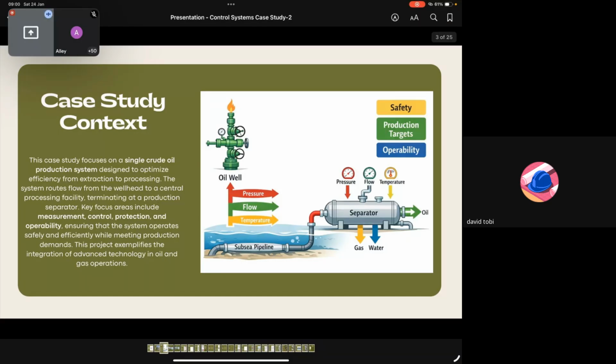So if, as a company, I have a template and I have some materials in stock that I can use, then if you give me the project, I can promise that maybe these other companies will have to go to Europe or the US to buy materials. But since I have it in my store, I can promise you I can deliver this project in 1 month. Others will be promising 3 months.